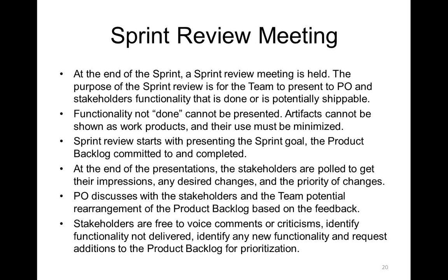Now the time comes that the team has to prove that whatever they have done meets all the acceptance criteria. For that purpose, the sprint review meeting is conducted. The sprint review meeting is again a time-boxed activity in which the team demonstrates that whatever has been done is meeting the acceptance criteria. This meeting is open for everybody, but the product owner has the onus of critically examining and accepting the stories if they are completed.